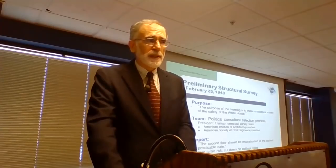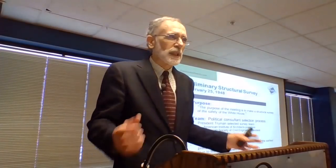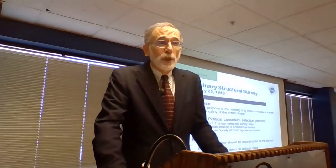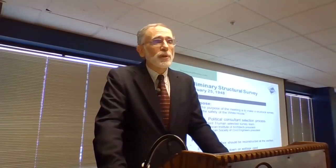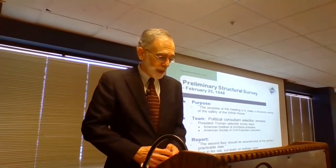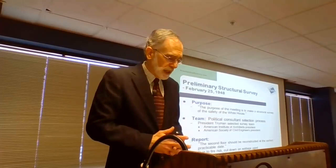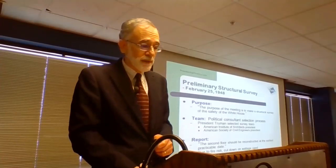So a month later, on February 25th, they had a preliminary structural survey done of the White House to delve into it a little bit more. They picked some consultants to do it. They had no consultant selection process; the president himself simply picked the leaders of the National Architects Group and the National Engineering Group to do the study. Their conclusion was that the second floor should be reconstructed at the earliest practicable date. Due to the fire risk, they also said that usage of electricity should be cut down. And they said there needs to be a much more detailed structural survey done of the building.